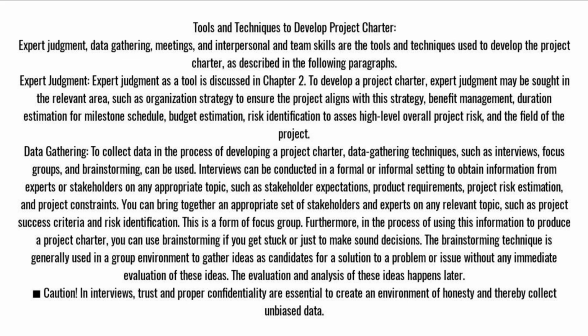Expert judgment as a tool is discussed in Chapter 2. To develop a project charter, expert judgment may be sought in the relevant area, such as organization strategy to ensure the project aligns with the strategy, benefit management, duration estimation for milestone schedule, budget estimation, risk identification to assess high-level overall project risk, and the field of the project.